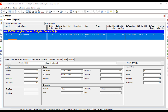The problem is it only disconnects those fields on that started activity. Any other activities coming next — if you created a sequence — have not created their own baseline in the background. They're basically free-floating, and the planned, budgeted, and original fields still equal the start, finish, at completion duration, and at completion labor units on future activities. It's not until you mark an activity as started that P6 actually disconnects the original duration from the at completion duration and the budgeted labor units from the at completion labor units.